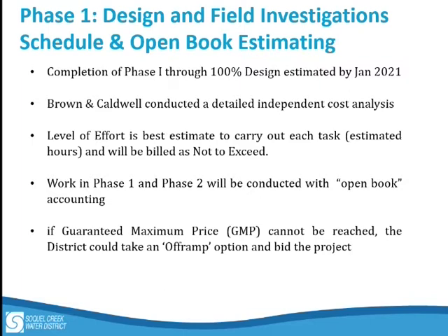It is an open book accounting, so they're going to share with us, and they are entitled to a markup that they've already listed, and it's in the agreement. And currently, that's an 8% overhead and profit markup.